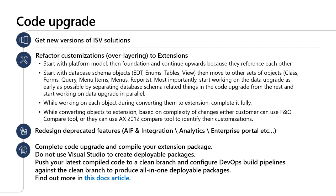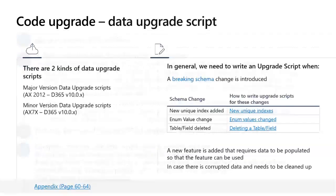Complete the code upgrade and compile your extension package. Do not use Visual Studio to create deployable packages. Instead, push your latest compiled code to a clean branch and configure DevOps build pipelines against that clean branch to produce all-in-one deployable packages.